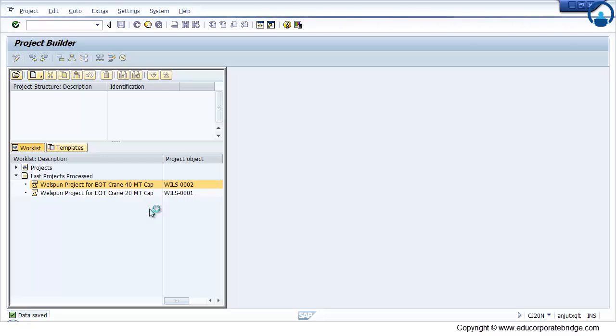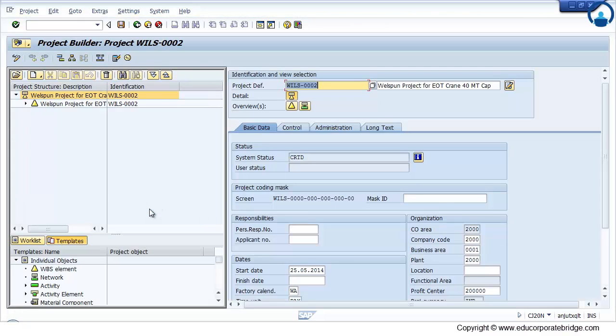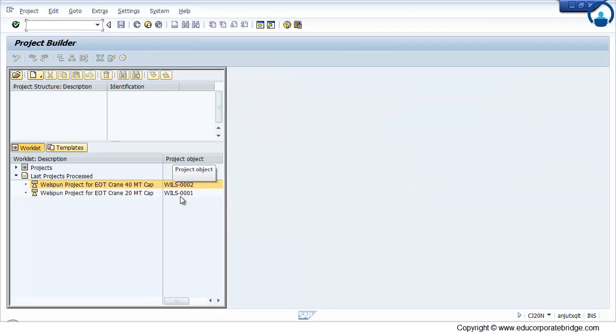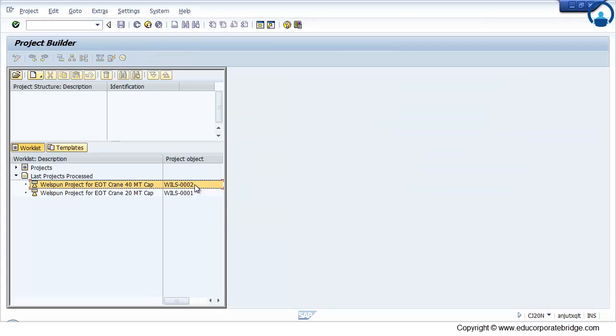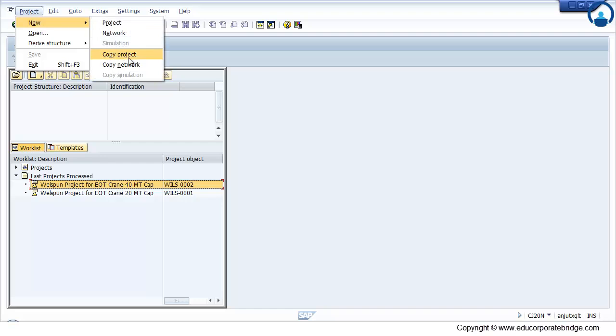Now there is a third way to create the operative project. That is copy from operative project to operative project. Now if this is the project 02 which I have created manually, I want to create one more project from the operative project. Just go to the project new, copy project.